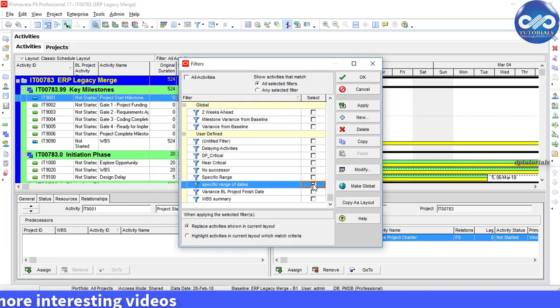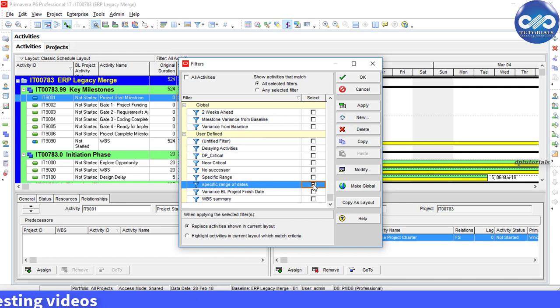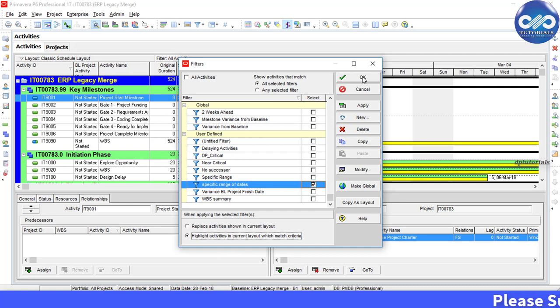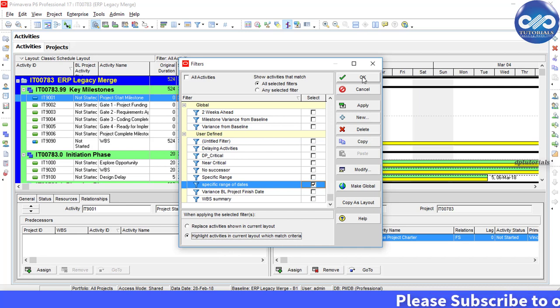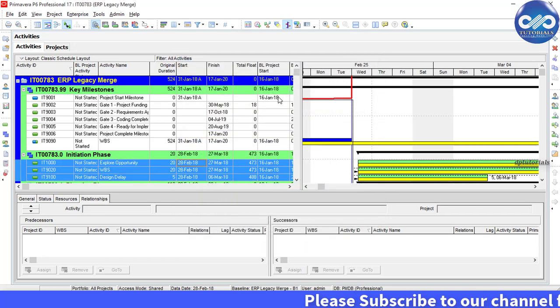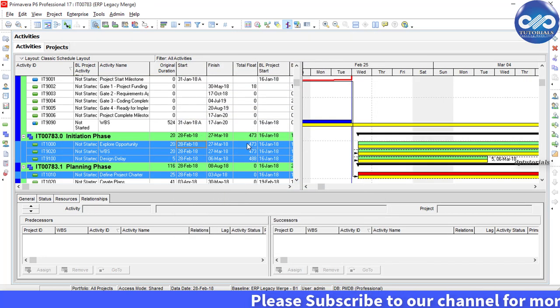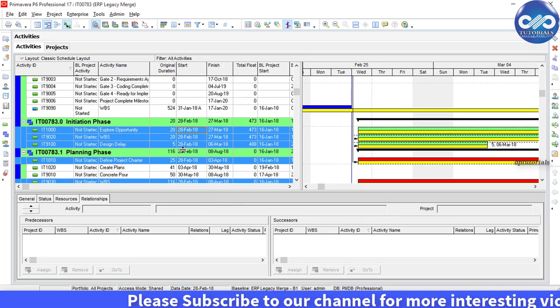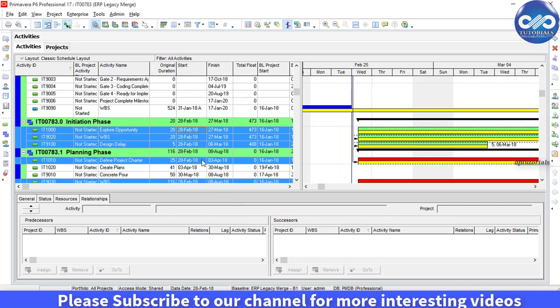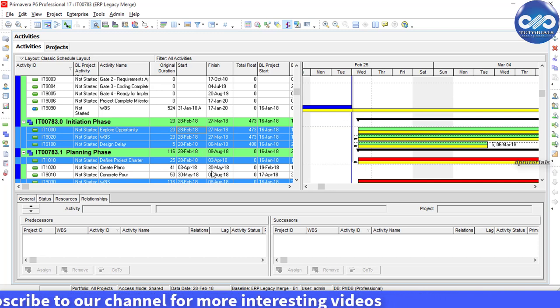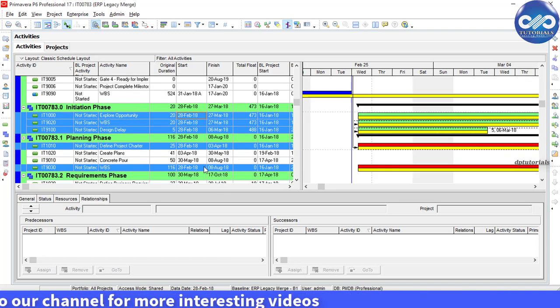Now, select the filter specific range of dates and then select the feature highlight activities in current layout which match criteria which is at the bottom of the filters dialog box. Select OK and your activities view will be like this. All the activities within our data range are highlighted in blue like shown here.